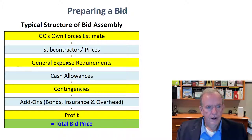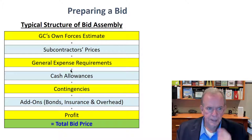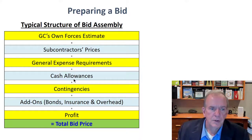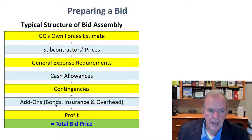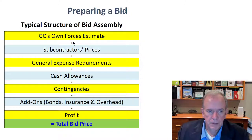To summarize: own forces estimates, sub prices, general expense requirements, cash allowances, contingencies — things that would have been in the specifications and general requirements — and then the add-ons: bonds, insurance, and overhead, which we'll talk about coming up. And what's your profit target margin? Add them all up and make sure you don't forget one of those line items.